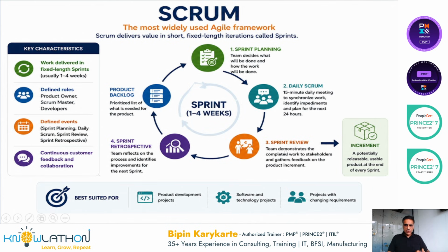You review the sprint. The team demonstrates the completed work to stakeholders and gathers feedback on the product increment. Okay, I'm developing a mobile banking app. So I develop a feature in those 2 weeks. I deliver that feature to the customer. I give a demo to the customer. The customer tests or gives some feedback, etc. So that is what happens in a sprint review.